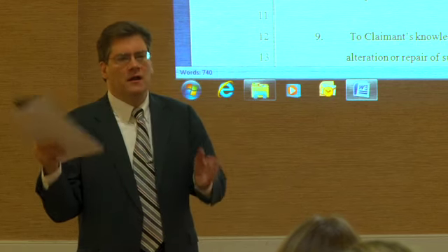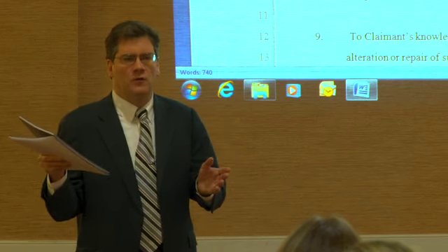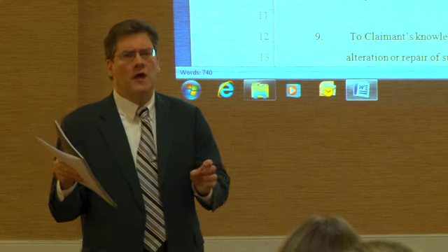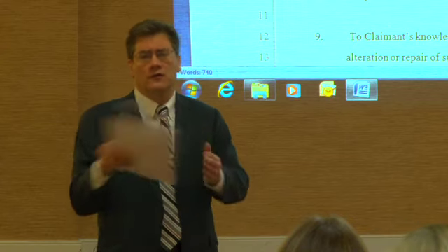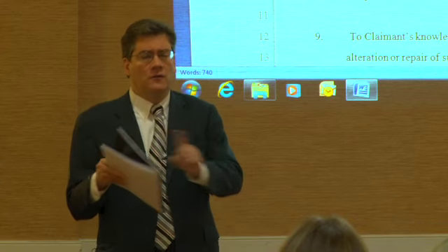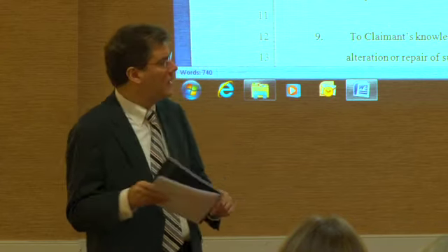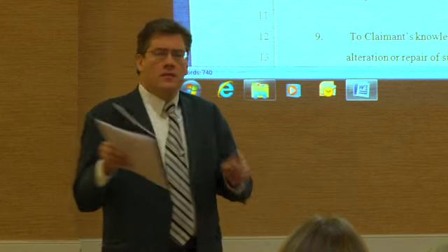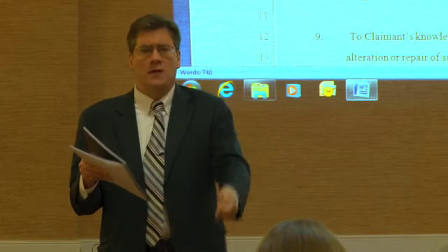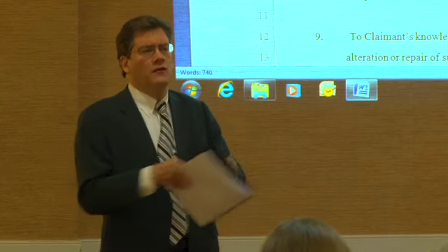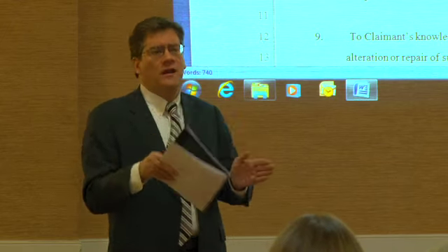I say all the time, 99% of the contracts formed in the world are actually oral contracts, but they all have to have a price term. Now the price can be barter, it can be labor in exchange for labor, that's still a price. Sometimes the price is money. So you want to have a statement of account saying how much is due or the invoices to flesh out the credit application.